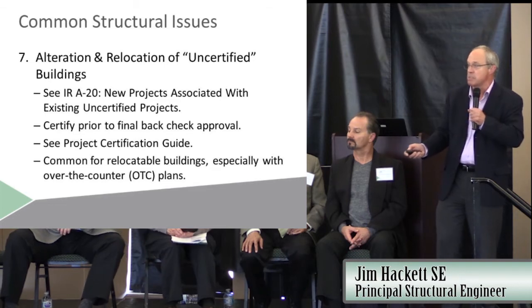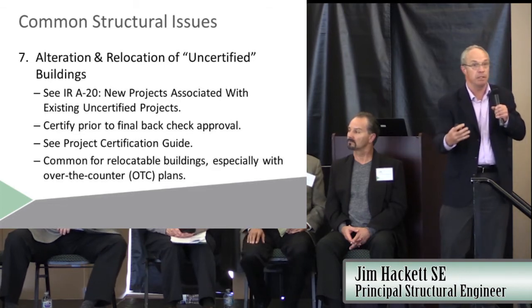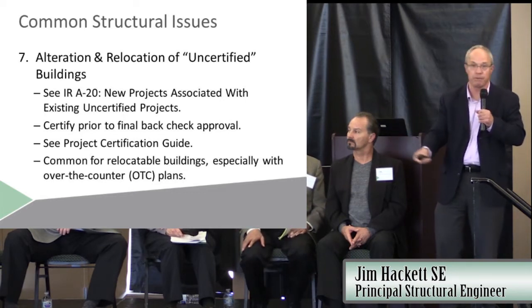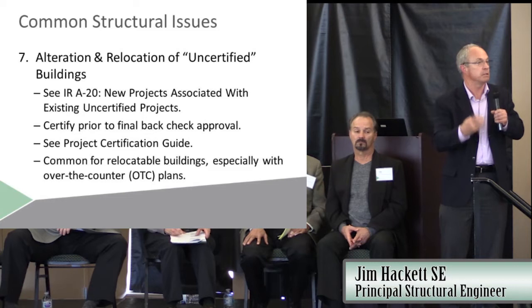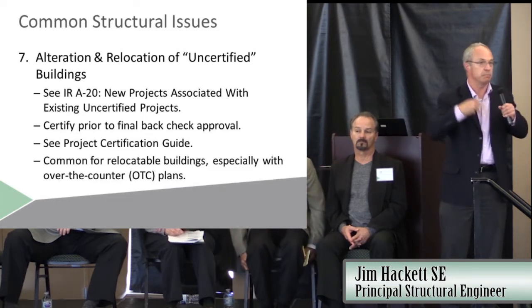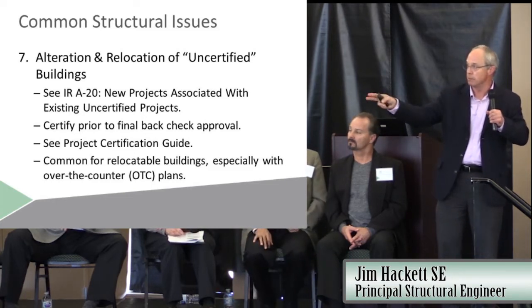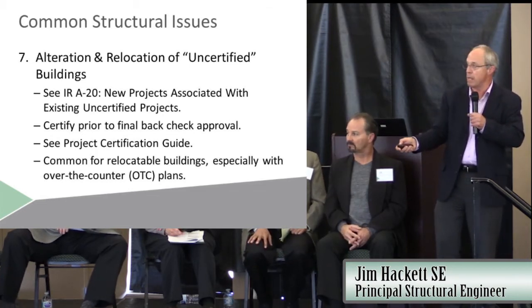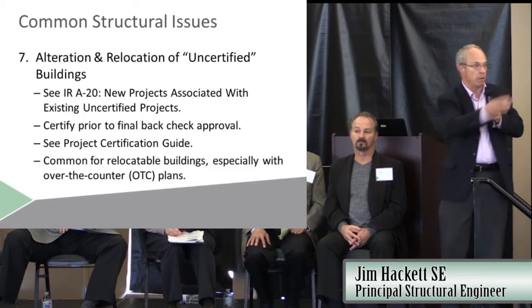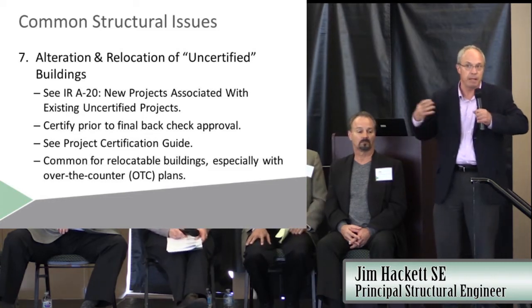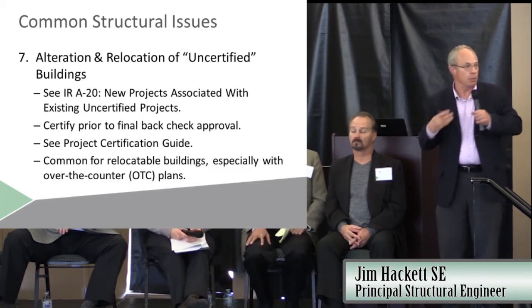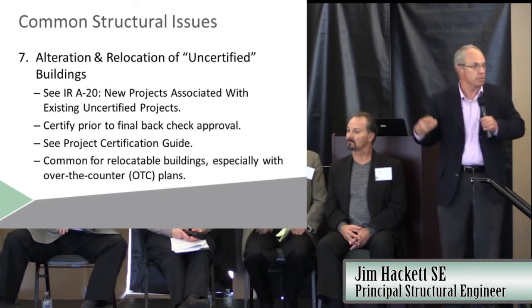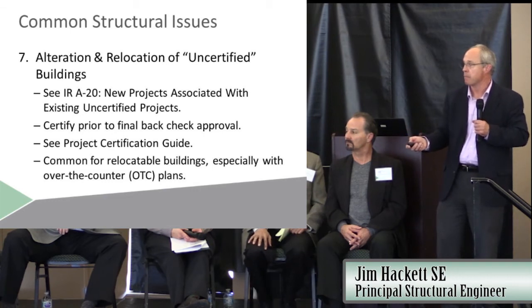If it was a building that was deemed to be uncertified, you can actually submit it. You can go ahead and do the work and work towards getting it certified. We won't be able to approve it until that building's been updated, unless it's been linked in with the new work. But you can do that, and then we'll just kind of wait. So if you're in the process of working with Harlan's group to help get that old building certified, and you know you're making progress and you think it's imminent or you're getting close, go ahead, do the work. Go ahead and submit it to us and we'll review that project.